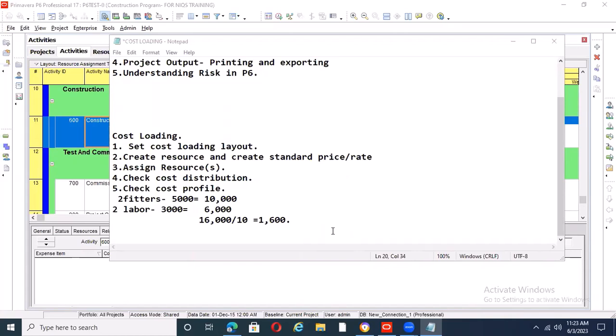Usually you can use your Primavera to form your BOQ, right? You can decide to use it. But if you want to do your traditional BOQ, you do it in Excel, then start transferring it here. Or maybe in some cases you had a tender document, so you were not the one that developed the BOQ. The BOQ has been developed, the price bill has been developed and was given to you. Then you now price and get the contract, then you can start transferring. That's fine. So that one, you have it in Excel and you can transfer to P6.